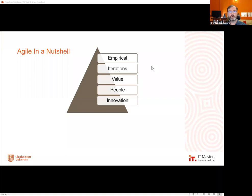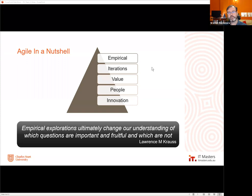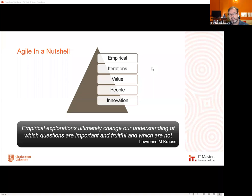Generally, you use agile when you want something new. If you're building a bridge, you might not be very agile about it — you probably wouldn't decide halfway across to bring it down from three lanes to two. Essentially, when we focus on the idea that it's empirical, it's discovery, it's an exploration — you ask different questions. Different questions matter up front and different questions matter later. Instead of making every decision up front, some decisions are actually important now because they have dependencies — things that other things will depend upon. Let's isolate those decisions, make them, and then delay the ones we can make later.